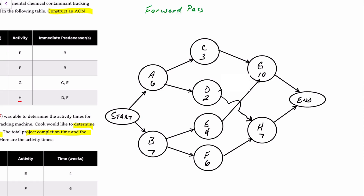Both activities A and B start at time zero. Activity A starts at zero; zero plus six means it will end after six weeks. These are the earliest start and earliest finish — the earliest activity A can start is immediately, but the earliest it can finish is in six weeks. Activity B can also start immediately, and adding the seven weeks it takes, the earliest it can finish is in seven weeks. So again: earliest start, earliest finish.